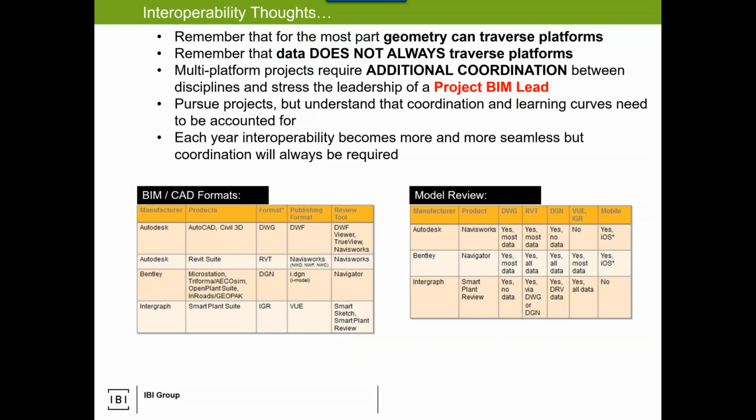And then I say, hold on, tell me about your project. Oh, we got someone in India, someone in London, someone in Toronto. One wants to use Revit, one wants to use EcoSim, and one is doing Civil 3D. Then I say, yeah, let's rethink that budget I just told you. So those dialogues are so important, okay? And I know this just from the history. I yelled at Brent, you blew the budget, and I explained the budget was blown because scope was not well defined, schedule was horrible, whatever it is. So those dialogues are very important.